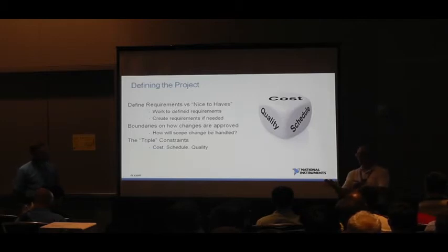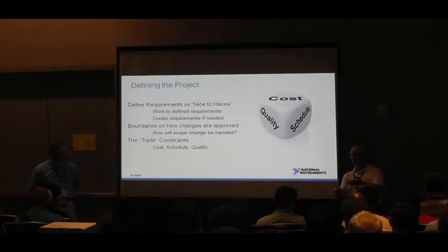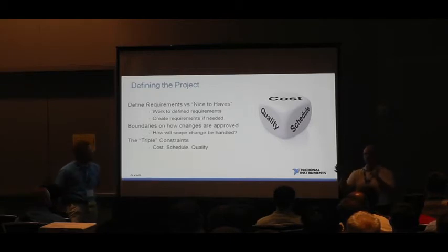But scope still is important with time and materials agreements, because if there are 5 key items that they requested to be implemented in that time and materials agreement, and if you spend all your time doing other things and only got 3 of those things done, they're not going to be happy. So you really need to focus, even on time and materials agreements, on what's in scope and make sure those get done first.